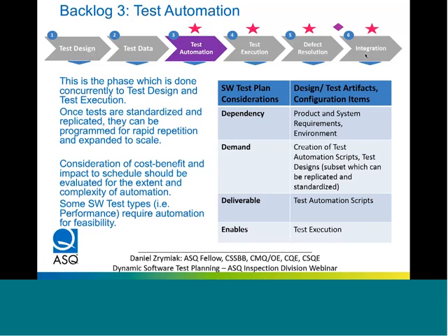And because it's dependent on the application, the environment, and something testable, it does not have to wait until every component is available. You can start once you have the materials for your test design and the application or the modules under test. These can be assigned to the people as they're available.